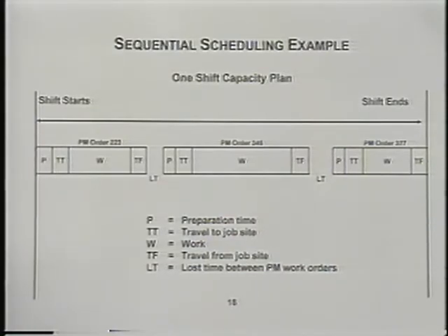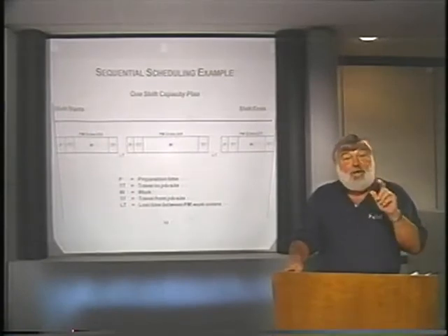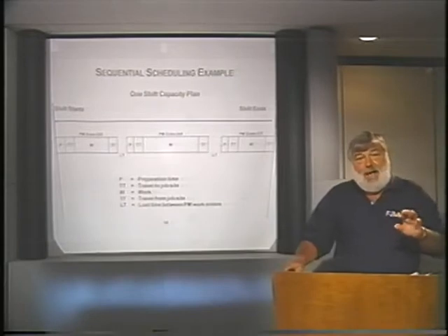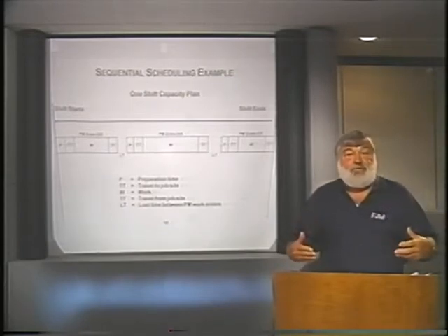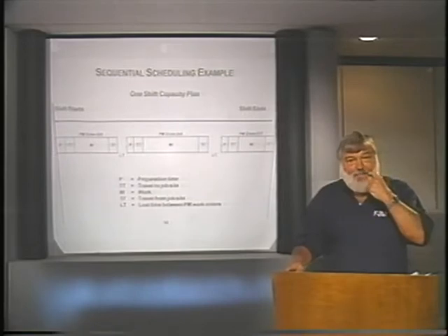But again, P, the prep time that's done by the crib. It also illustrates that if it's done by the crib, that material could be delivered to the job site to save additional travel time for that PM operator to come back to the crib and get the second and subsequently the third order. But here's the important point. The total time on these three orders is going to be charged to the job. Now, I said earlier that I'll show you how to earn more work order hours through the PM scheduling system by putting in actually less time on the job. And that is